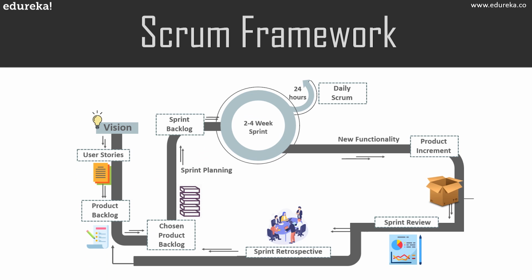So how does this entire process of Scrum happen? The Scrum process starts with the product owner. The product owner creates something called the product backlog. It's a list of tasks that the team decides to do to create a project. After that, the entire team, which is the product owner, the Scrum team, the development team, and the Scrum Master, have a meeting and decide what tasks are important and which they should include in a particular sprint. Those tasks go to something else called a sprint backlog.